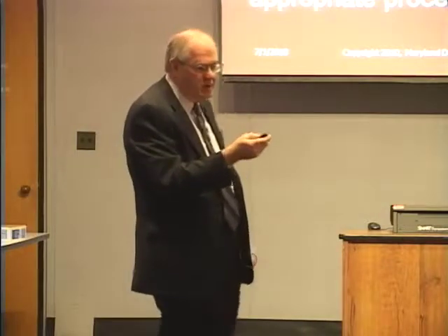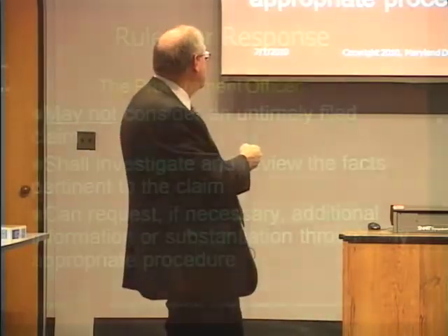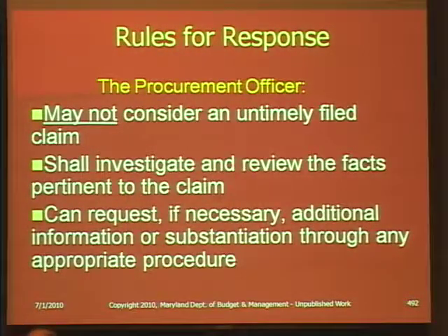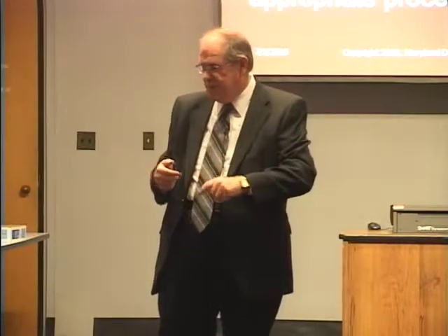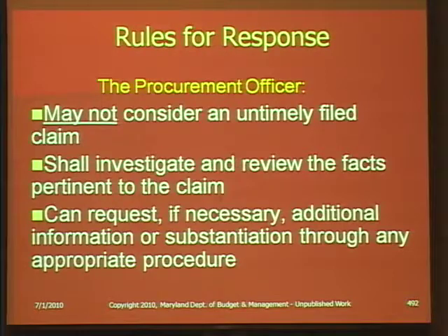We've gone through that. But if you have it, the procurement officer may not consider an untimely filed claim. May not, cannot, not permitted to, prohibited. And there was actually a protest one time on the words may not, because the vendor claimed that since may is a permissive word, if you take may by itself, it means you're permitting something. Their argument, and some of you have already started laughing, but the argument was, and we changed the slide before we talk about the answer, that since it was may, the procurement officer had discretion as to whether or not to accept it more than 30 days after the time when the basis was known or should have been known, because may is a permissive word.